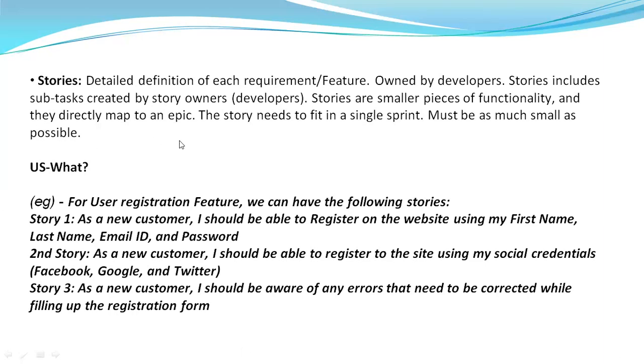See, we are dividing the epic into user stories, right? So each epic should have user stories mapped, correct? And each user story should have an epic mapped, correct? Then only we will be able to understand whether we are completing an epic or not.